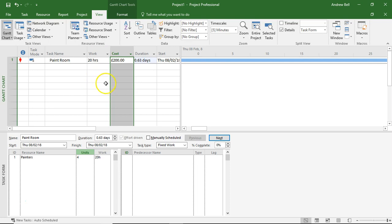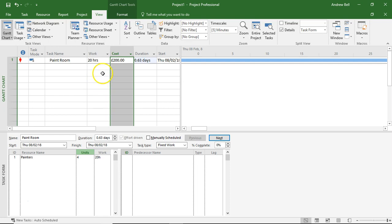So I also have to assume here that those painters are only going to charge 20 hours to the project. And if there's 10 of them, they're each going to charge two hours to the project. And they are going to get paid in their other time by another project, or I don't have to pay them while they're not employed on the project tasks.